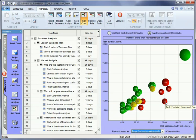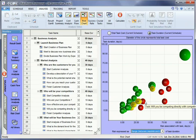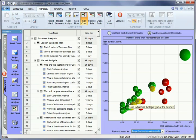In well-balanced project schedules, different tasks usually have similar levels of risks. However, if the risks associated with a specific task are higher than for tasks with similar duration or cost, these risks should be carefully analyzed and preferably mitigated.